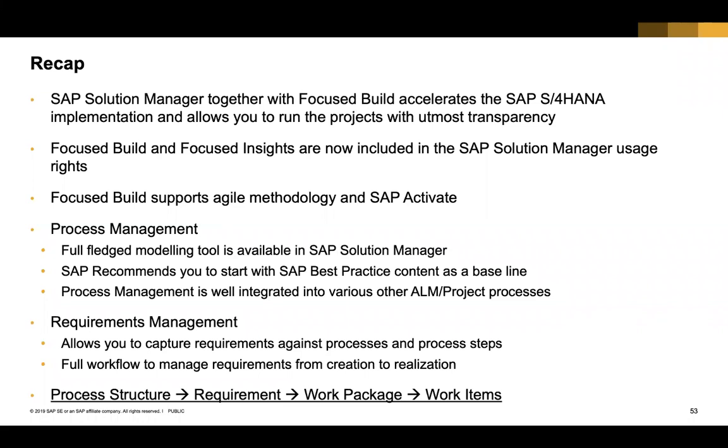We also talked about how process management is the bedrock for everything that we do in Solution Manager and Focus Build. We will also see how that gets leveraged through and through the project, starting with requirements management, which we will show in a demo today. In the requirements management, we did cover an overview of what requirements are, how are they captured, and what are the different workflows that we have in terms of the different statuses of the requirement, which we will also see in the demo. But more importantly, this relationship is something that you all have to remember, the process structure to requirement to work package to work items.